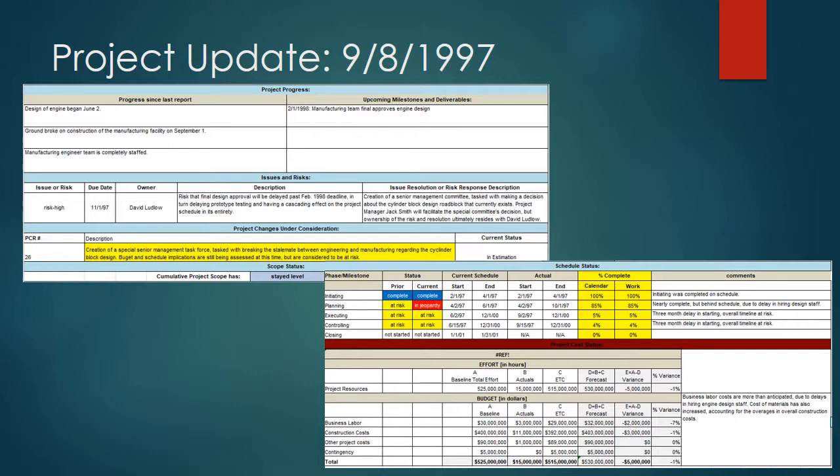Quick note on budget at this point: it's slightly overdue, but the contingency is still intact. However, if the stalemate isn't broken and they don't keep moving things along, the budget and schedule are at risk of spiraling out of control.